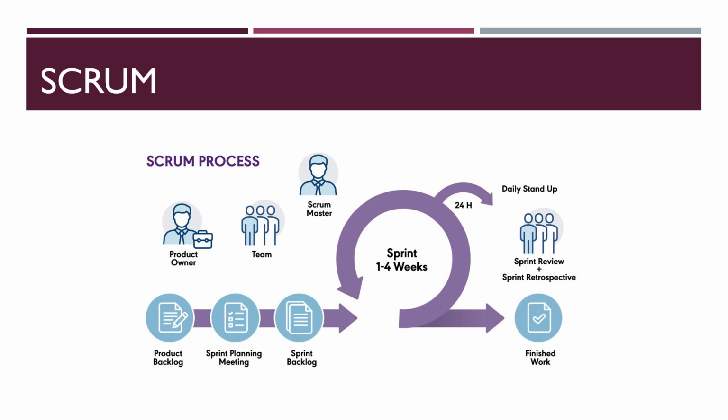And next comes sprint planning and creating a sprint backlog. First the Scrum team selects the most important user stories and breaks them into the smallest tasks, as small as possible, where the average sprint only lasts for 2 weeks. Here sprint means iteration, and throughout the sprint daily meetings are held. These daily meetings last up to 15 minutes, and the aim of this daily stand-up meeting is to gather the status of each team member.